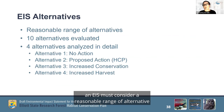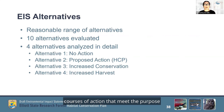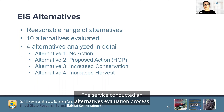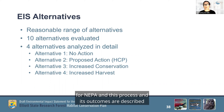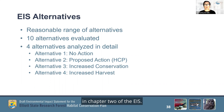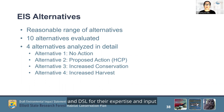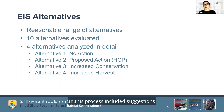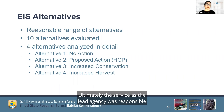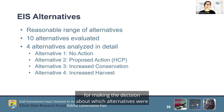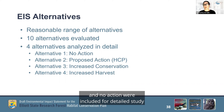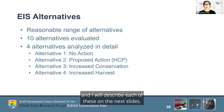In addition to the proposed action, an EIS must consider a reasonable range of alternative courses of action that meet the purpose and need and are technically and economically feasible. The Service conducted an alternative evaluation process based on federal implementing regulations for NEPA, and this process and its outcomes are described in Chapter 2 of the EIS. As part of this process, the Service consulted its cooperating agencies and DSL for their expertise and input on technical issues, and the alternatives evaluated included suggestions made in scoping comments. Ultimately, the Service as the lead agency was responsible for making the decision about which alternatives were analyzed in detail in the EIS, and two action alternatives in addition to the proposed action and no action were included for detailed study.